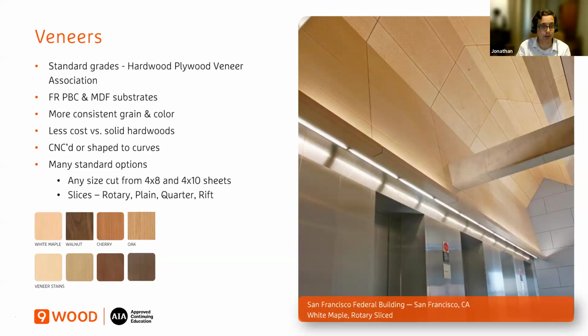So bring it up early if you're needing that type of situation where you're looking at veneers, particularly curved, and find out what the parameters are for the particular style you're looking at. There will be limits or parameters that the manufacturer can work within that are going to be more budget friendly and have less of a lead time impact.